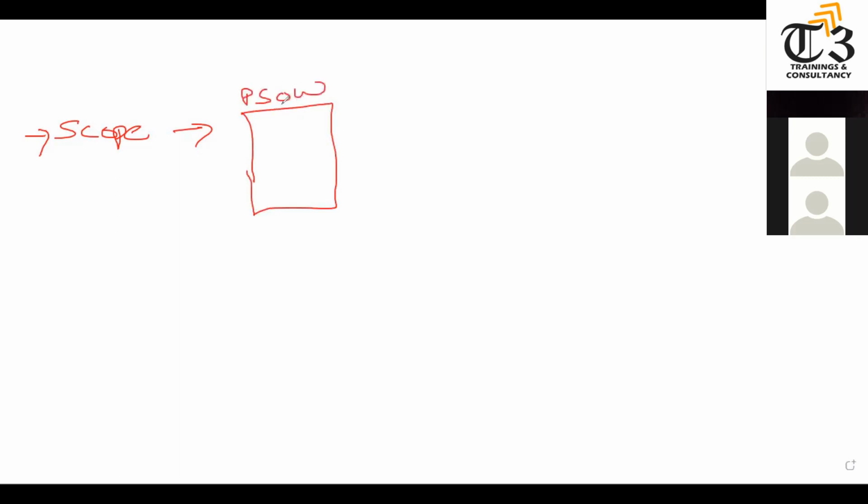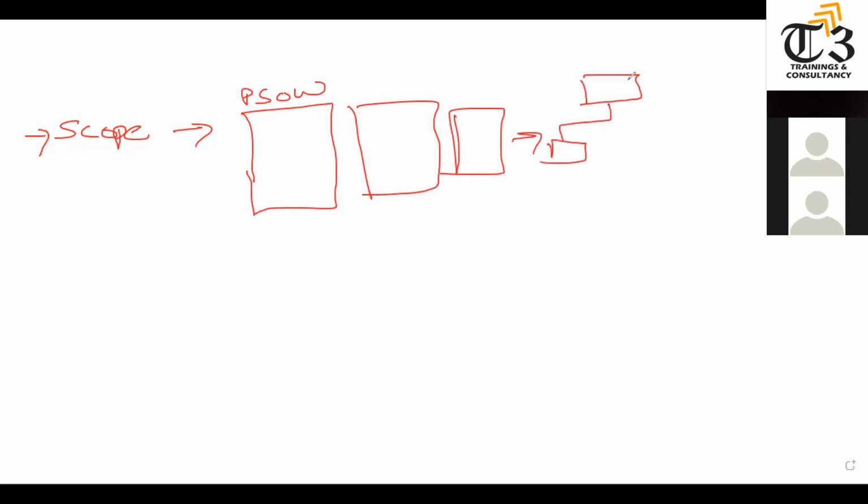The first scope of work or statement of work was brief, not that much detail, but this one is the project scope of work. SOW is very detailed. It could be a multi-page document if you are working in predictive. Once all the details are here, what will be the quality requirements, what type of resources you need, everything is there. And on that basis, you will create a WBS, where the first level of the WBS will be the project.